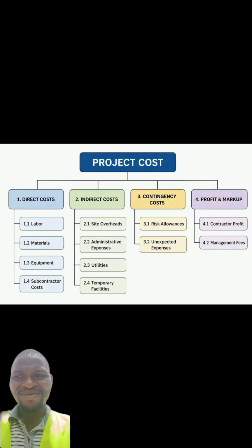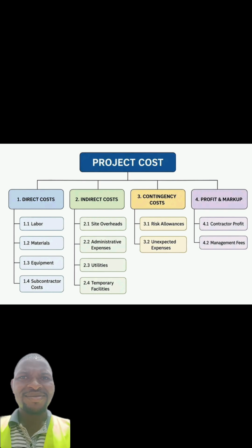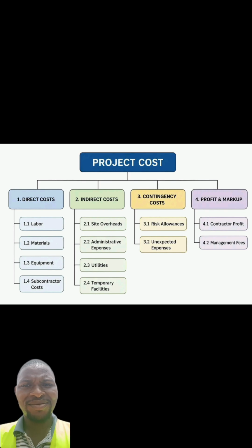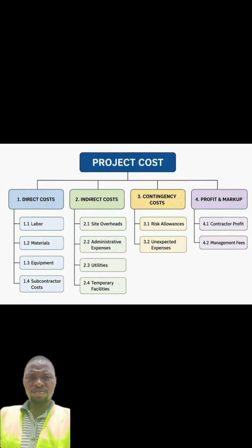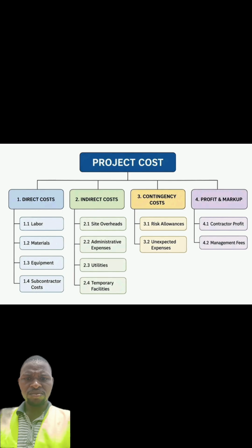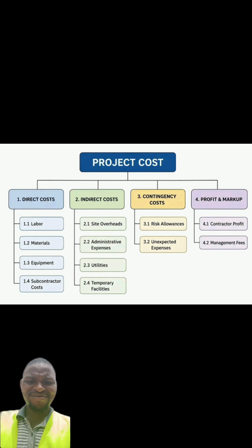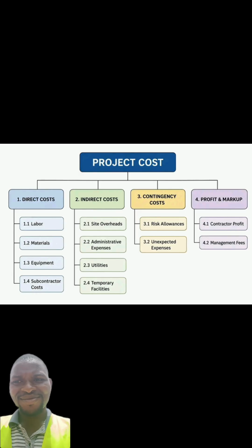These temporary structures are actually removed at the end of the day. So you factor in the cost of constructing them, and you also factor in the cost of removing them at the end.